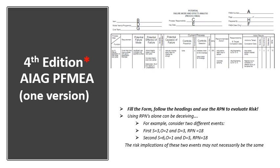as I said, the FMEA is an analytic method. So you've got a table, and from the tables you take the ranking, and that's how you rank it out of 10, 9, 8, from 1 to 10. Occurrence the same, and detection is the same. You multiply it out, and based on the numbers that you get, you can prioritize your actions based on the numbers. There is one thing here that has led to some of the ineffectiveness of using this method like this with a form.